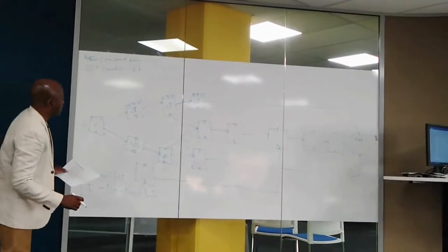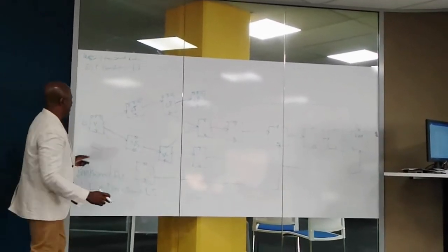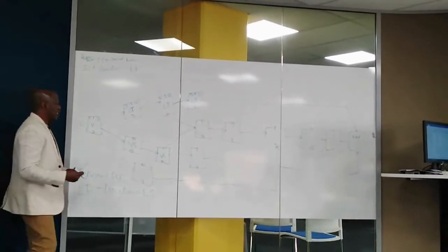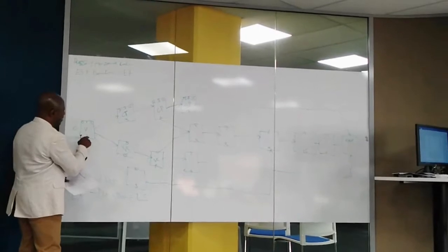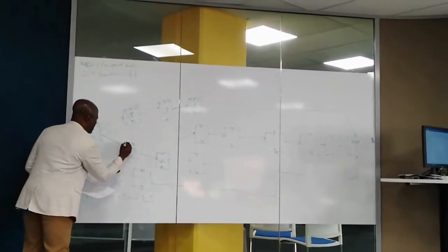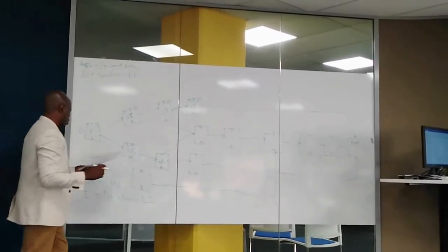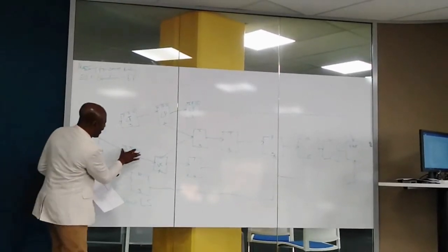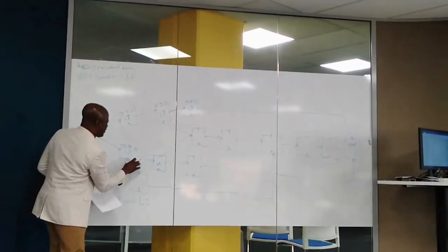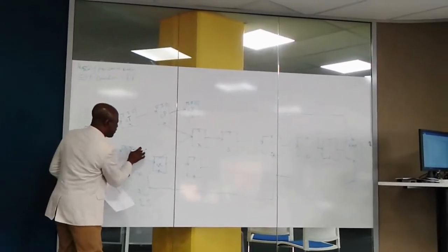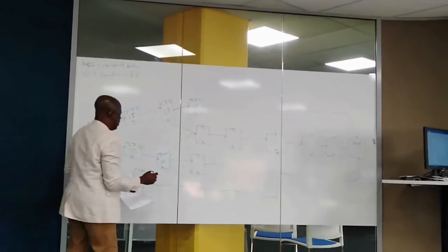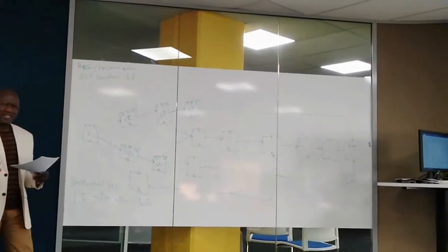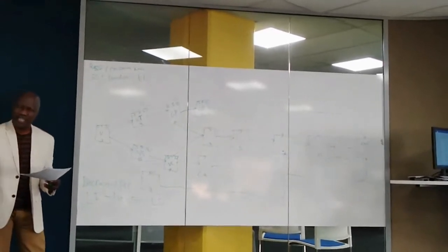Then we come to activity 5. Activity 5 is dependent on activity 1. So it has 0 here. How many days does it have to complete here? 3 days. So it's going to give us 3. Then activity 6 is dependent on activity 5. We have 3 days here for this to complete, and we put 7 here. Are we getting it? It's easy. It's just common sense.